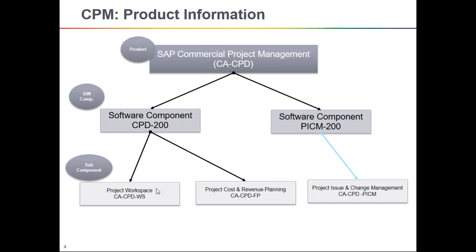Here we can have combinations of subcomponents. The major function of Project Workspace is to create a master project. Master project creation comes under the workspace, and if you want to do cost and revenue planning along with it, you need to use two subcomponents. If you also want to capture issues and change requests, that subcomponent also needs to be installed. This is the basis team's job. In S/4HANA, CPM will always be as an add-on in your system, whereas in older versions, you had the choice to keep it on a separate server.